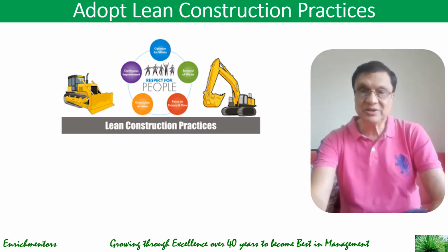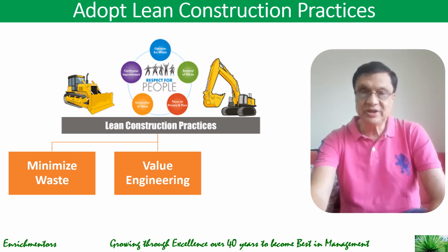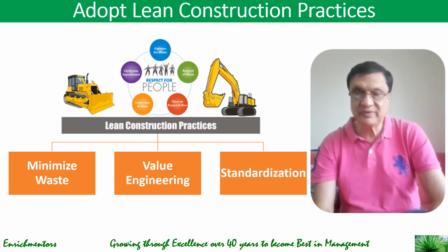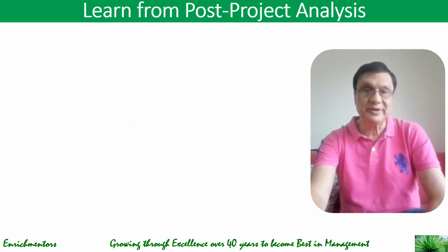Adapt lean construction practices. And what are these lean construction practices that you can adapt? You can minimize waste by using just-in-time material delivery to reduce storage costs. You can do value engineering by identifying cost-effective alternatives for materials and methods. And you can do standardization by reusing designs or processes where applicable to save costs. So lean construction practices is one very good way to manage costs within budgets and save something.